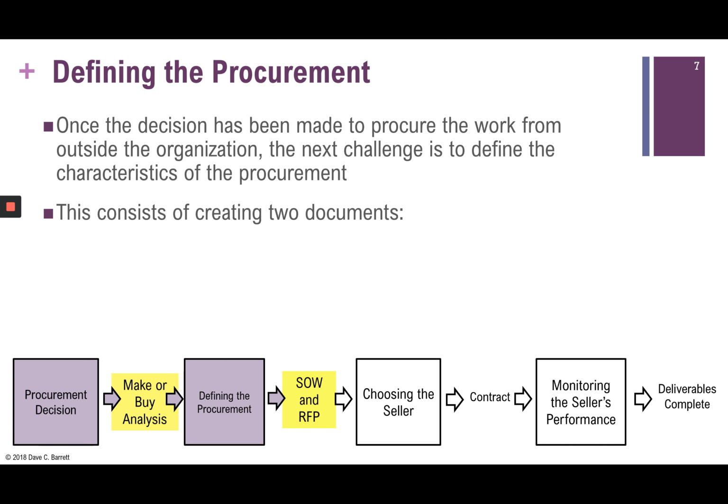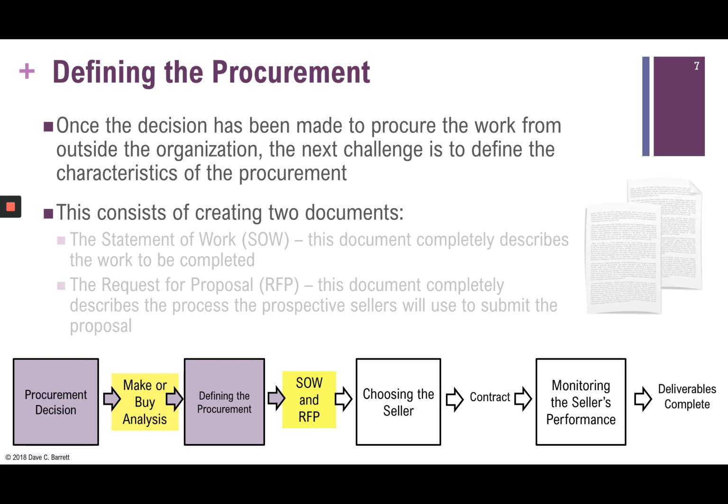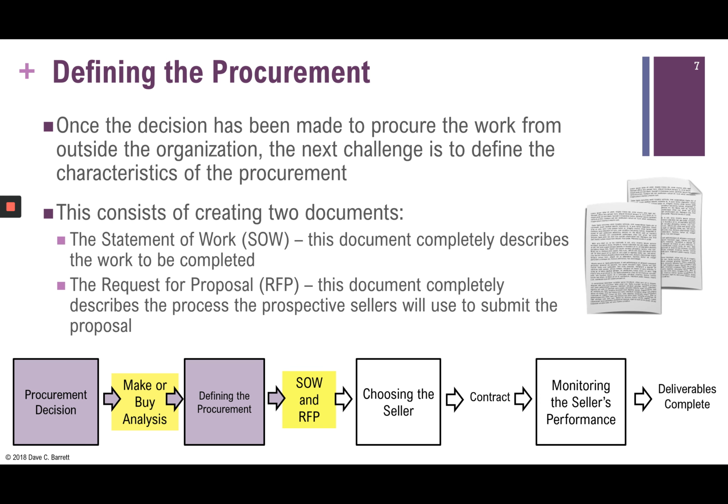And that consists of two documents. One, the statement of work. This document completely describes the work to be completed. And then secondly, the request for proposal. And this describes in detail the process the prospective sellers will use to submit the proposal.